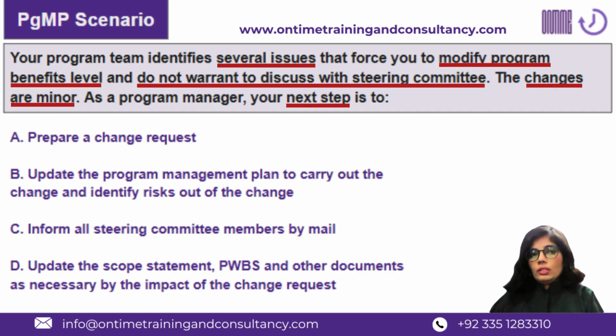And the next step after this is to inform, communicate to the relevant stakeholders and the team members so that they are aware about that change. And the final step is that you update your change log, and after that you keep an eye on that change, managing that change, right? So this is the step-by-step process.